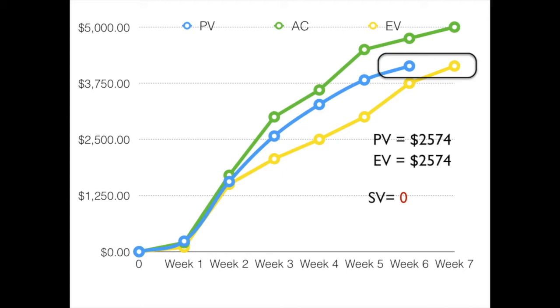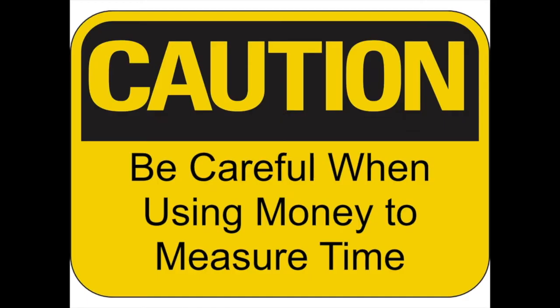The thing you need to remember is that looking at scheduling variance, scheduling performance index, and some of these other things where we're measuring our schedule or using money to measure time — that's all well and good while the project is underway or while that specific activity is underway, but it gets a little bit dicey once more and more project activities are completed. So, just be careful when using money to measure time.